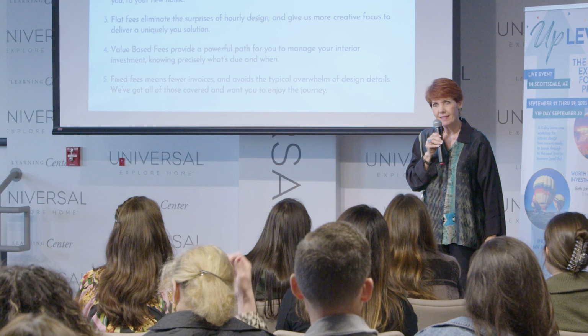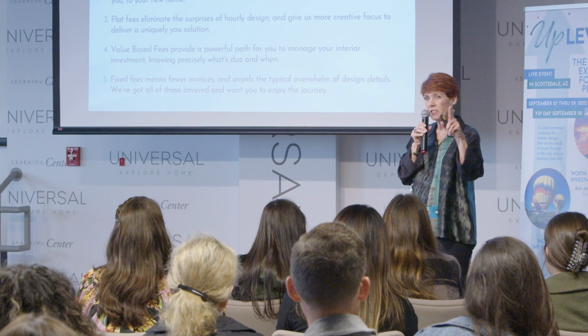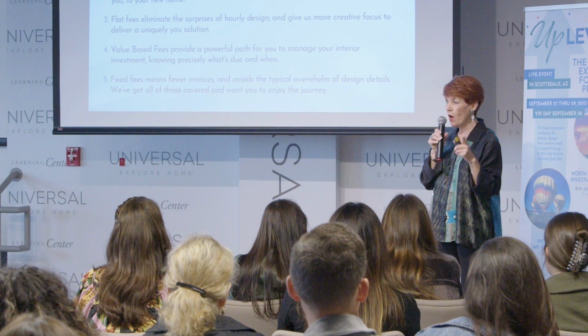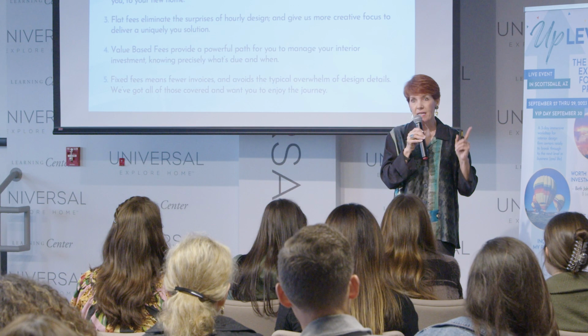And if you're stuck with hourly and you're determined you're going to ignore me at today's presentation and go off and do hourly after this, then please add a line item that says project communication, because that's going to cover all the time in phone, text, and email between you and the client, you and the contractor, you and the builder, you and the vendors, you and the installers, you and the workrooms. And hourly, I never build less than 30-minute increments.